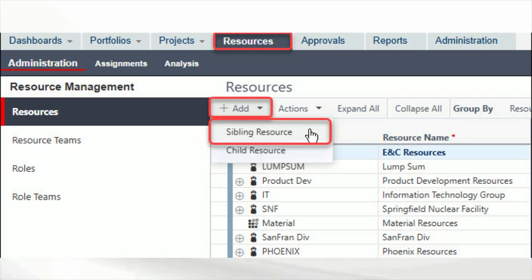But this is confusing. The fixed price cost can be mixed with budgeted labor and non-labor costs, which is not a transparent solution. The USACE SDEF lump sum labor resource method provides a more visible and workable solution. Also, the USACE SDEF conversion program will not convert these P6 Professional fixed price cost column data into the SDEF format.